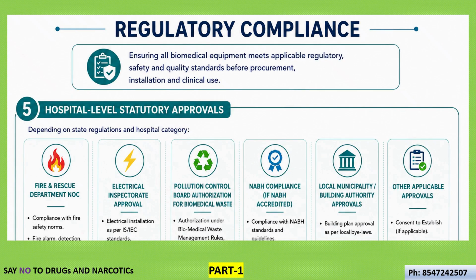In addition to all other approvals, hospital level statutory approval is also very important, like fire and rescue department approval, electrical inspectorate, pollution control board, NABH, local municipality, and other applicable standards for the installation and commissioning of hospital equipment. All these approvals are very important to run the hospital equipment in a proper way. Once all these approvals are obtained, it is safe to run the hospital in a safe manner.